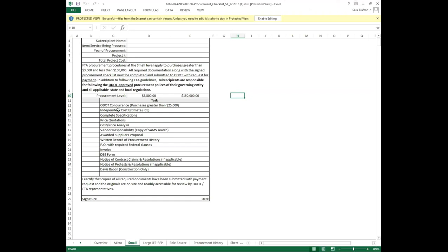Another thing I'd like to point out here is the vendor responsibility piece right here. This is in the SAMS. You're going to go online. What's going to happen in most instances is you're going to enter the vendor name in the System for Award Management. SAMS stands for System for Award Management. And you enter the vendor's name. More likely than not, it's going to pop up and say no results were found. There are no results. It seems a little funny, but we need you to print that out and include it with your information. This proves that